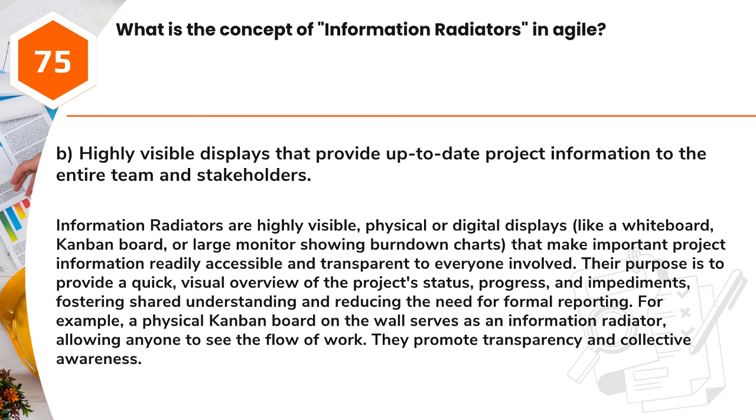Their purpose is to provide a quick, visual overview of the project's status, progress, and impediments, fostering shared understanding and reducing the need for formal reporting. For example, a physical Kanban board on the wall serves as an information radiator, allowing anyone to see the flow of work. They promote transparency and collective awareness.